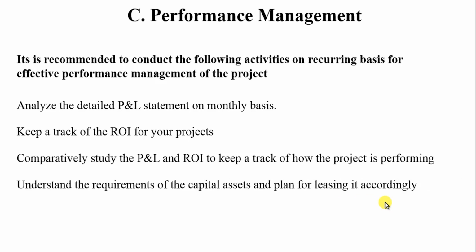Understand the requirement of the capital asset and plan for its leasing accordingly. Based on the previous session, where we understood the entire capex versus opex scenario, buying versus leasing: if your project requires a substantial amount to be invested in a fixed asset, and you determine what period of time you need that asset to complete your project, you make up the analysis. Is it better to buy the asset with the resources, or is it better to lease the asset? Time is the biggest factor there.